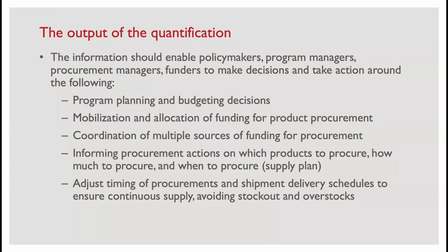Informing procurement actions on which products to procure, how much to procure, and when to procure. So that's how we use that information to help us with our procurement. And then we will adjust the timing, as we saw in the exercise with Greg, based on when is it most appropriate to ensure continuous supply and avoid stockouts and overstocks.